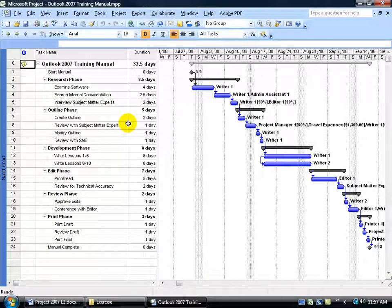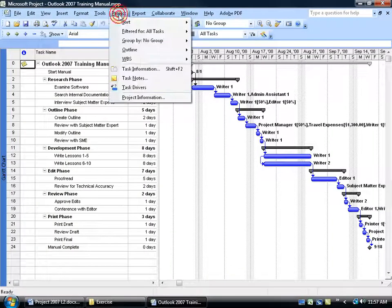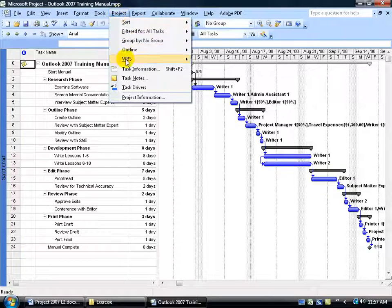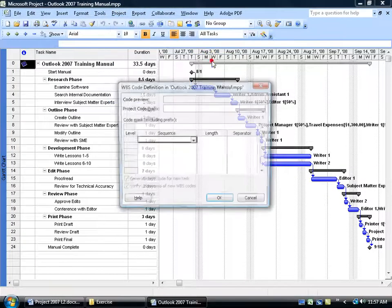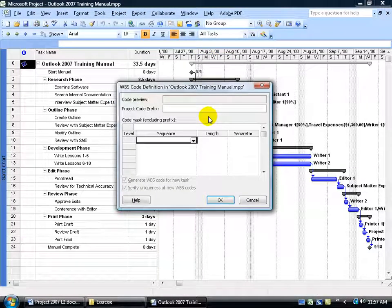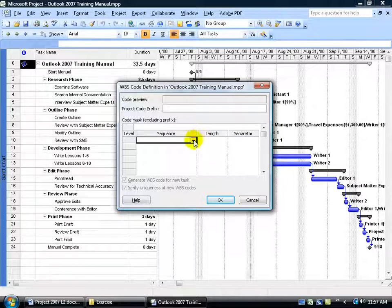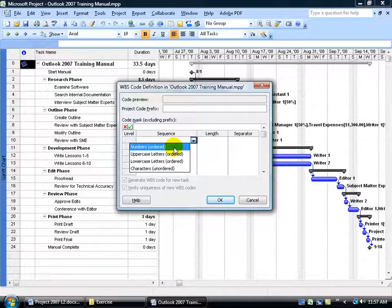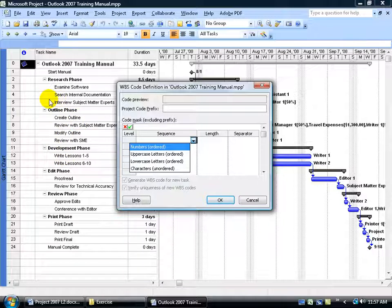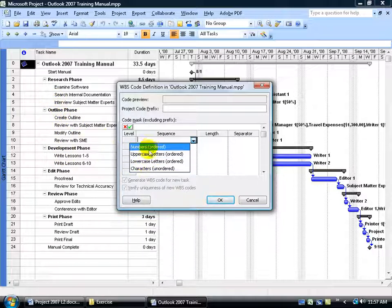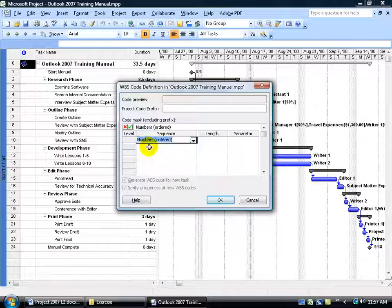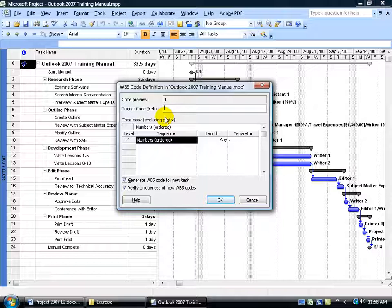To define the WBS codes for this project, come up here, click on the Project menu, go down to WBS, and let's define the code. There's several ways you can define the code. You can click on the drop-down arrow and say you wanted the typical number order, as you saw in the default outline, 1.1, 1.2, and so on. You can use letters, lowercase, characters. I'm going to use numbers. And then do I want a project code prefix? Well yes, I do. As you recall, this is going to be my project 1, so I can type in, or it's a subproject within the master project, I could say subproject1 dash.